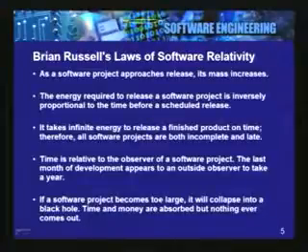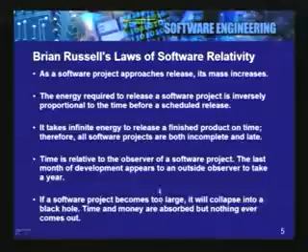You can read the rest of these on the screen, but what these are basically trying to put in perspective is the software crisis that was occurring in the 80s, that every time the project got delayed, a lot of people got put onto it, so there were manpower issues, and that was not the way to solve this. Like Fred Brooks also said in the late 80s, adding people to a late project is only going to make it later.